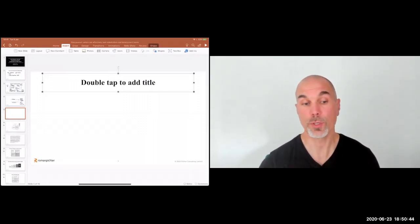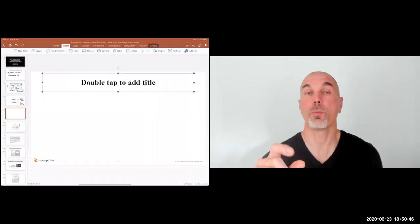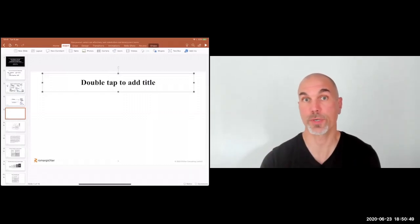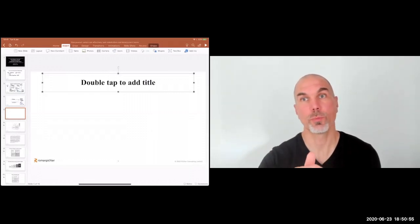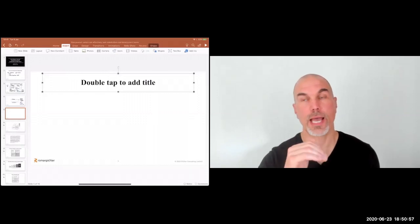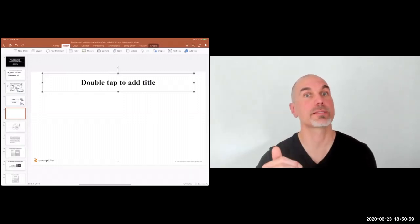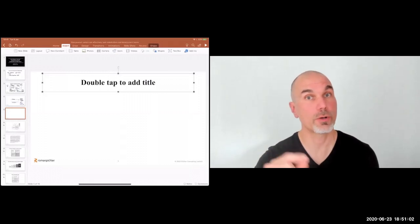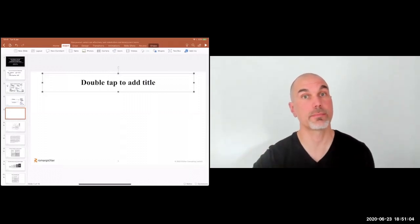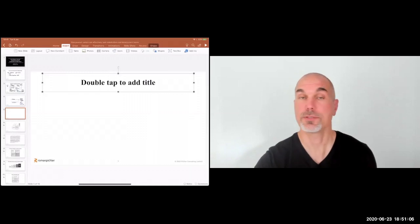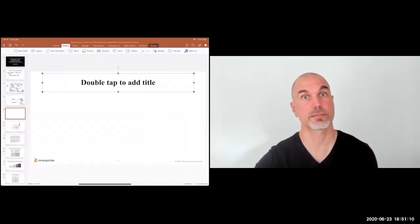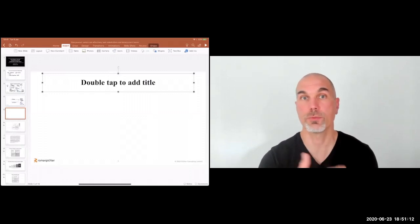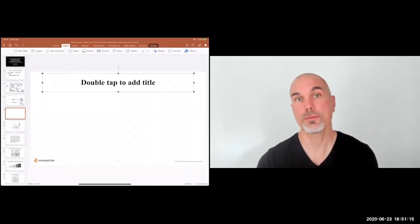What you should do is really look at what you intended to achieve with the sprint — what is the desired outcome or sprint goal? And based on what you're trying to achieve, say: how can we best test and validate that we've met the goal? Is it through a product demo? Is it through some form of usability testing — which sounds a bit like what you were describing? Or through other means?